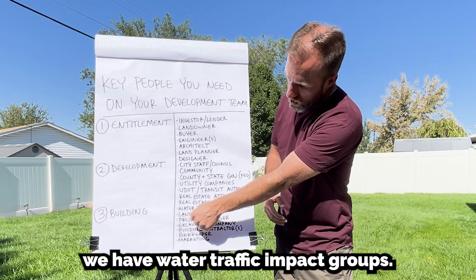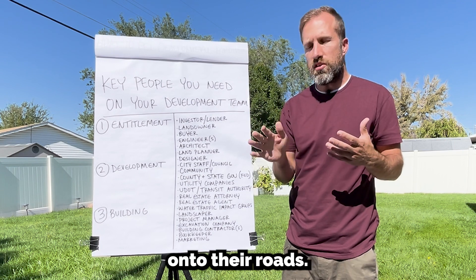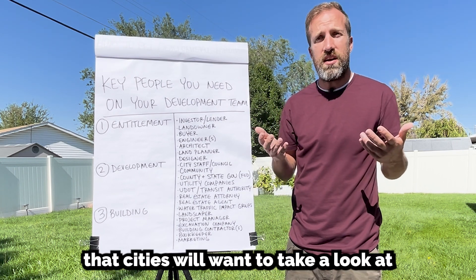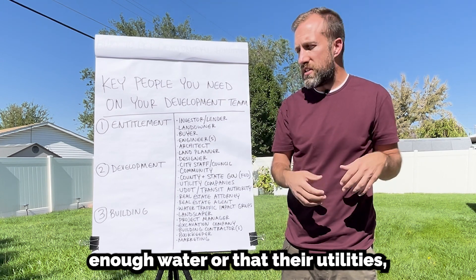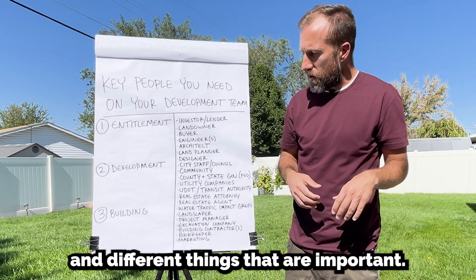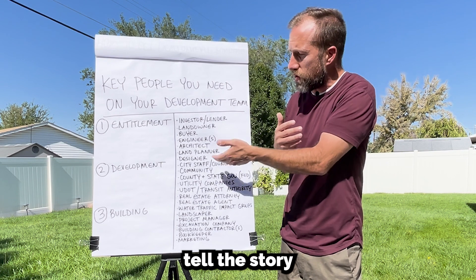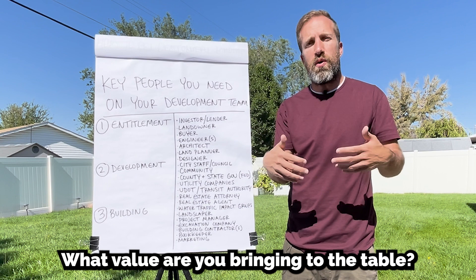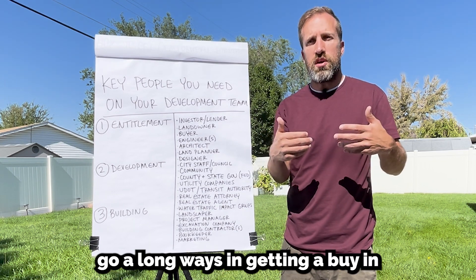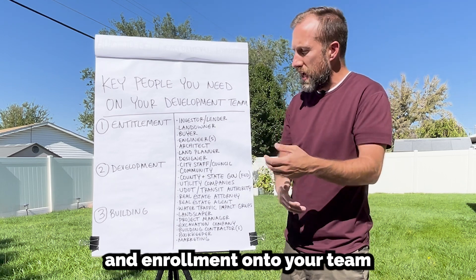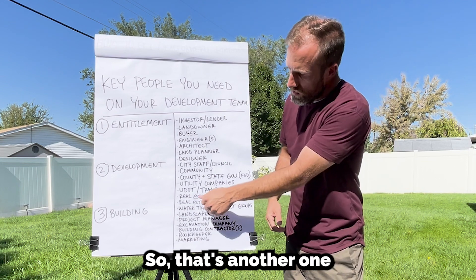We also have water and traffic impact studies. UDOT requires traffic studies for access onto their roads. Cities also want water studies to confirm there's enough water capacity available. The economic impact study helps tell the story to city staff, council, and the community — what value are you bringing to the table? These studies go a long way in getting buy-in from the community and enrollment from recommending and voting bodies.